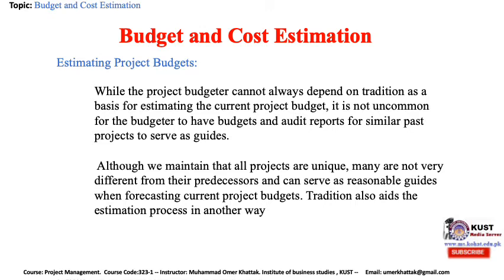One aspect of cost estimation and budgeting not often discussed has to do with the actual use of resources as opposed to the accounting department's assumptions about how and when resources will be used. For instance, presume you have estimated that $5,000 of a given resource will be used in a task estimated to require 5 weeks. The actual use may be none in the first week, $3,000 in the second, none in the third, $1,500 in the fourth, and the remaining $500 in the last week. Unless this pattern is detailed in the plan, the accounting department — which takes a linear view — will spread the expenditure equally over the 5-week period. This may not affect the project's budget but it most certainly affects the project's cash flow.